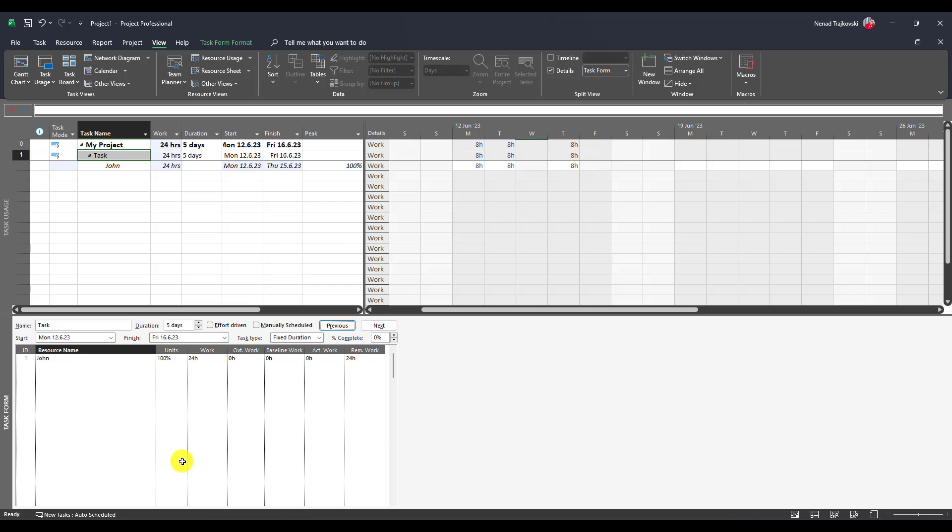A lot of people are asking me, if this is a fixed duration task and it is five days and we know that John is not available all days, why doesn't Microsoft Project extend duration to seven days? Because if it extended to seven days, automatically John will fulfill his 40 hours as it was expected.